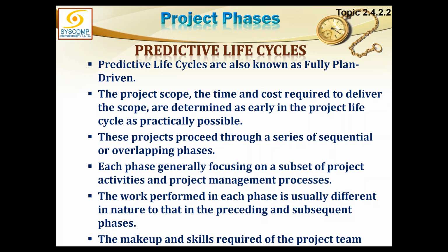There will be projects in which you won't know much in the beginning, but you will learn along the project life cycle. Those are called adaptive or incremental projects. You will plan an outline and plan the first phase in detail, and leave the next phases to be thought of later as more data becomes available. Right now we are not talking about that. We are talking about a predictive life cycle in which we already know a lot about the project, almost all the data we require is available, and there is a small chance of change.